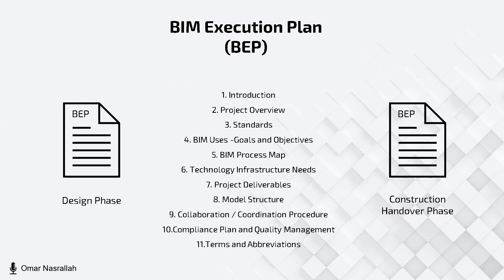Since the project was an IPD contract, the lead appointed party presented their BEP — known as a response to the AIR — in which all project-related information would be reflected in this contractual document. Our BEP was created in several sections highlighting the project requirements and the responsible team throughout the project life cycle, covering different scenarios such as curtain wall supplier, concrete designing company, or finishes material supplier, as roles and responsibilities changed throughout this master's program.